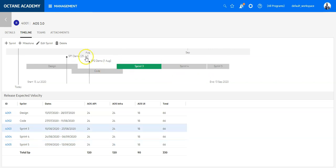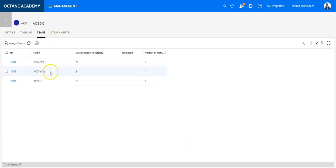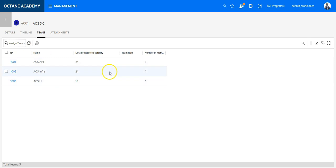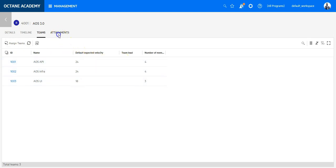Under the tab Teams, you can assign teams here. These are the default teams which are assigned with the default expected velocity on story points to deliver per sprint.